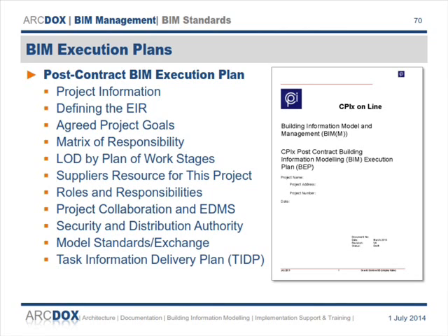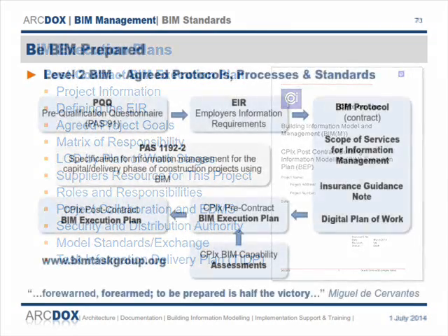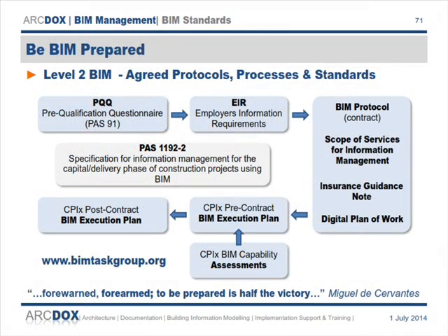Yeah. That Kerry Group project is a good example. There was a lot of partitions taken down. Yeah. Because they were put up wrong. They didn't take account of the services.